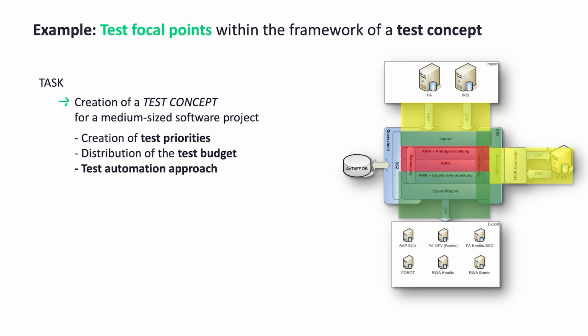However, focusing the test strategy on the set of rules also has its price. Less test budget was left for other areas of the application. For example, the development team only carried out rudimentary testing of the interfaces with which users can search for and display the evaluation results. The reason for this was that although errors in the GUI hinder the work of the users, and therefore have a noticeable potential for loss, such errors are comparatively easy to detect in an acceptance test.